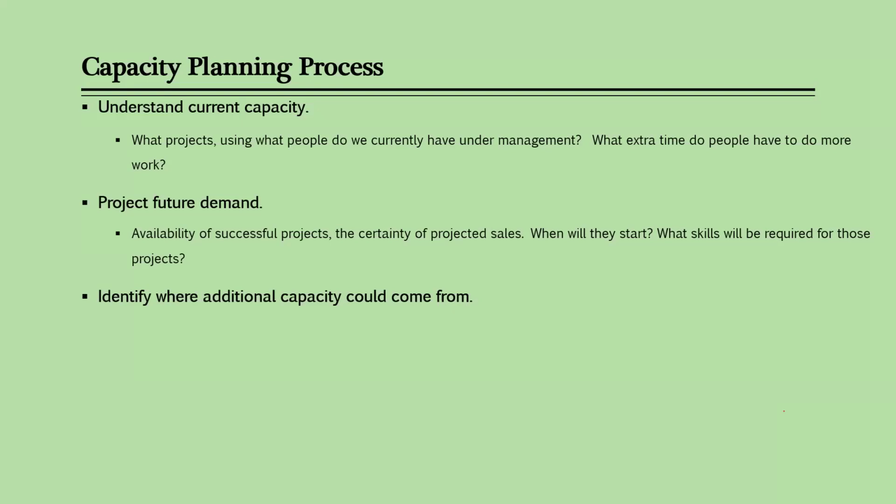Then we have to identify where additional capacity would come from. If we need more resources, how are we going to acquire them? Whether employees can work extra hours, or whether they have to develop new skills for these projects. And if we are unable to do both of them, whether we are able to hire more people. And again, we have to assess the risk.